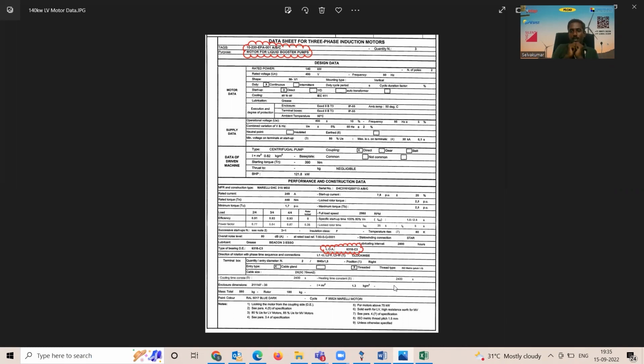That's because you may not have all the information you need, and you will not do the relay coordination until you get all the information from the motor manufacturer and the particular release model. When you have a cable schedule, a motor data, a transformer data, a short circuit report approved, when you are approaching the relay coordination, you might have already ordered the release, because only with the release you will be able to do the relay coordination: release details, make, model number. Instead of Schneider, if you are going for an ABB, the release details will be different. If you are going for somebody else, the release details will be different.